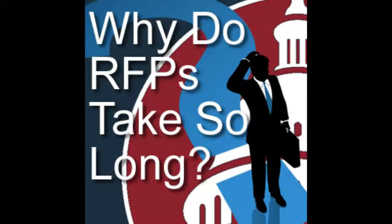Exactly. And for a small business to think about this, say it's a $5 to $10 million contract. That's still going to have 3 or 4 different people looking at it. So for example, when the questions come in during the RFP phase, and one of the questions is whether or not they'll change the evaluation criteria. Well, that's a big change. So let's assume for purposes of this conversation that it makes sense to change the evaluation criteria and maybe make past performance more important. That's not something the contracting officer normally can just do on their own.